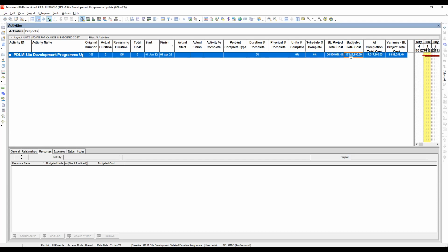So now, since our updated program was retrieved into a budgeted total cost without the markup cost, we have to run the global change again by adding again the markup cost. But for now, we have to update the units, having the markup units also.